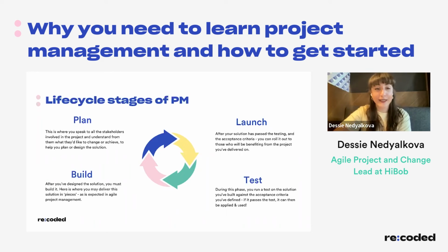And then you've got the testing. So during this phase, you run a test on the solution, on what you've delivered, to be successful, and you've built against the acceptance criteria that you've defined. So what do you define as successful? What do you define as good enough? And then you test what you have put together in line with this to see whether it's been a success or not. If it passes the test, it can then be applied and used or launched, or you can go ahead with the event that you've planned for a birthday or a wedding or anything else.